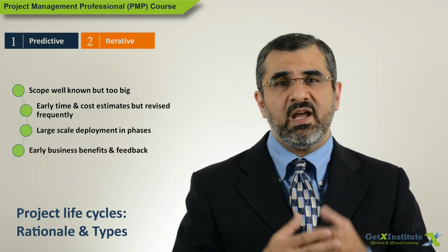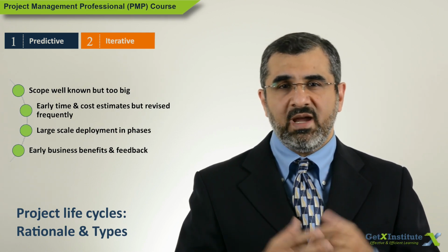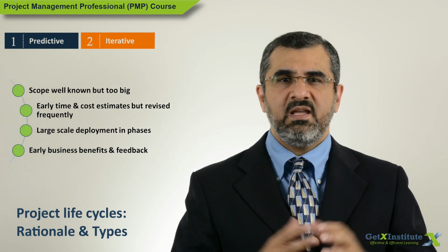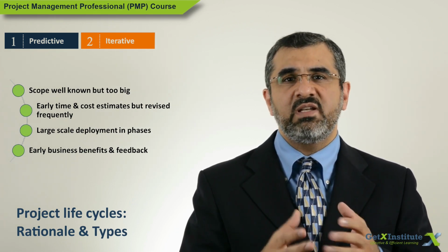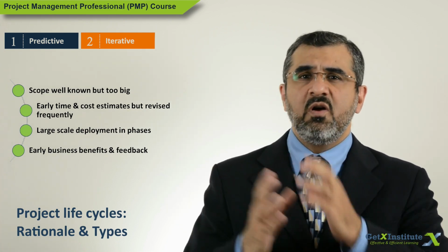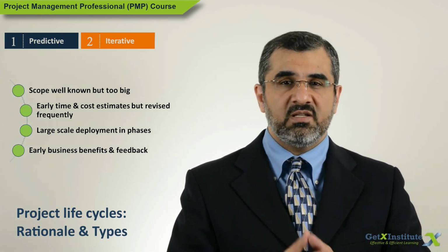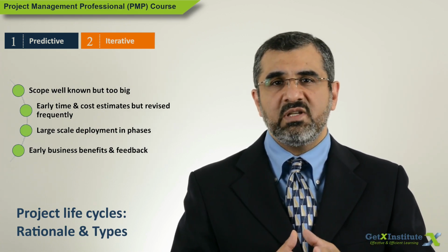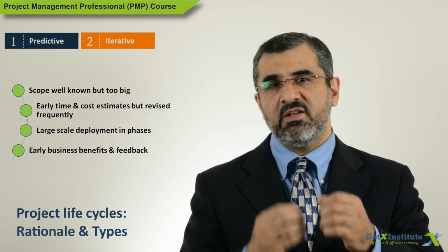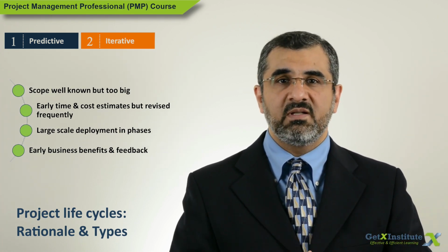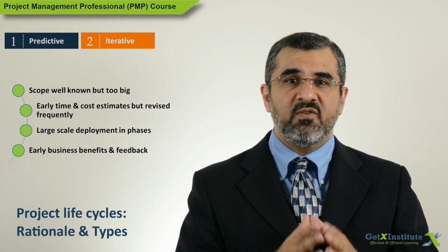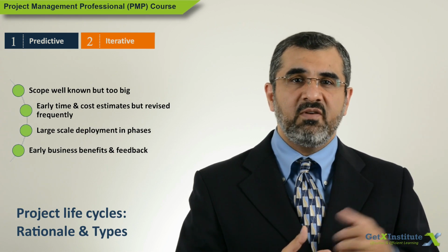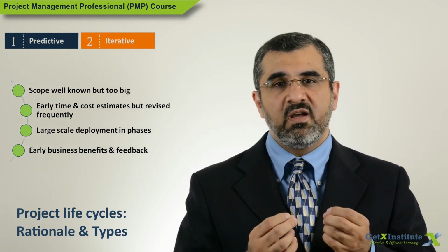It is a good way to get feedback on the delivered scope and modify the current and future work if needed. Let us say a large university decides to move its campus, buys 200 acres to put up about 30 buildings in 10 years. 2 buildings are up in 2 years. Should these be put to use, or the project team should ask the university to wait for another 8 years before all 30 buildings are up? Handing over the 2 buildings for use has 2 main benefits: early feedback that can help later work, and early realization of business benefits.